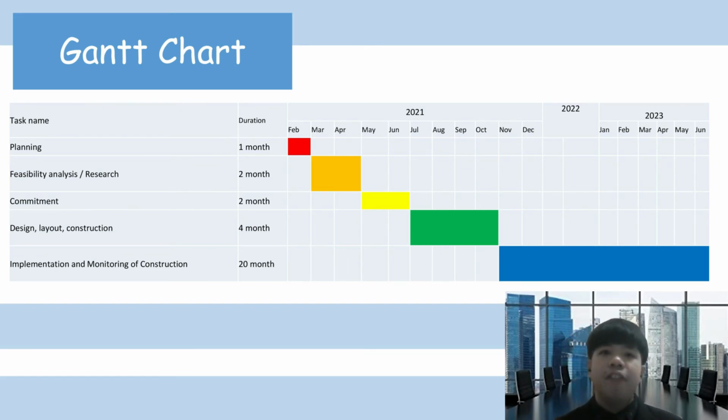In addition, the third phase task is commitment. Commitment is very important. This phase involves the final negotiation for the aspects of the development commitment, maybe in the form of a formal agreement. Two of the most important of these are the environment impact statement, EIS, and the decision about ownership structure and financing. Obtaining development rights of the site and development of the general land use plan are also elements of this phase.